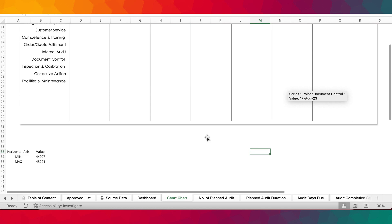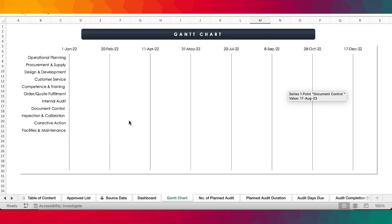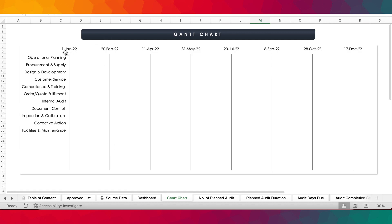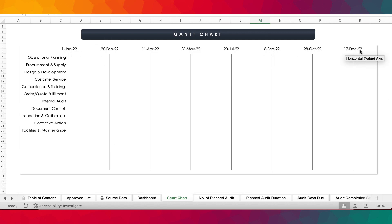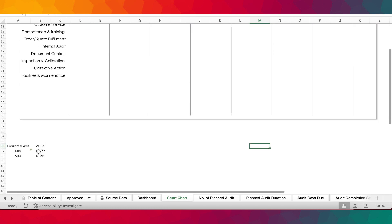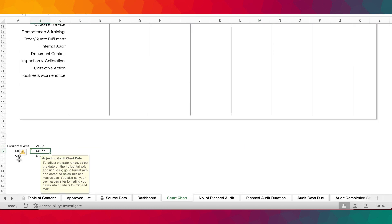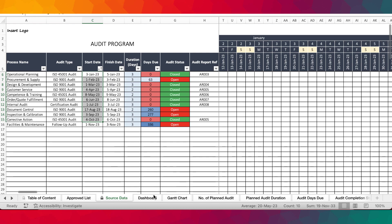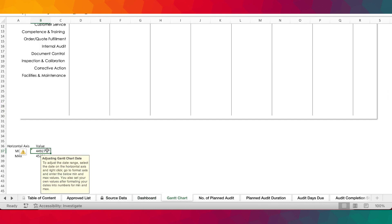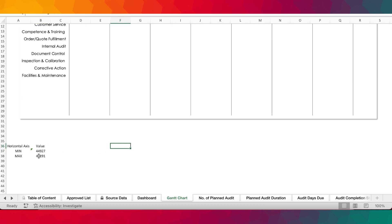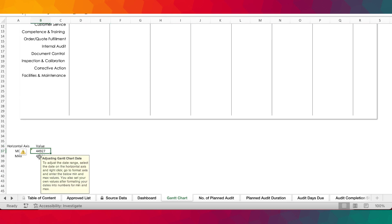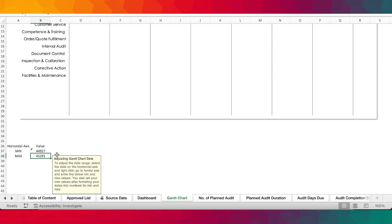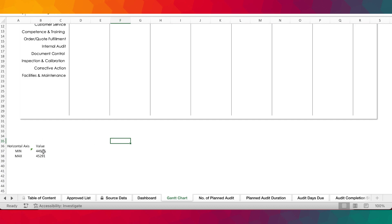Regarding the Gantt charts, there's an important note — you need to go an extra mile to fix the Gantt charts. This is because they are based on 2022 dates and we need to change them to 2023. This is based on minimum and maximum axis values. The minimum date within the timeline or start date needs to be set in the Gantt chart. We've already worked out the calculation for the minimum date and added 364 days to get the maximum date. These are dates expressed as Excel numerical values.